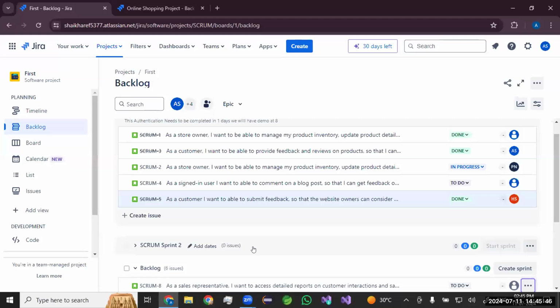What is the culture? All team members early in the morning at 9 o'clock assemble together physically. They stand together in a circle. They check the review in the sprint. What are the tasks completed? What are the tasks pending? Are there any issues going on? Once that information has been properly shared and the concerns have been shared, these people go back to their desks and keep working independently. So we are not disturbing anyone's privacy. And again tomorrow morning, we are again going to check the review.